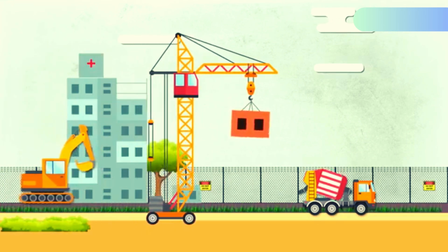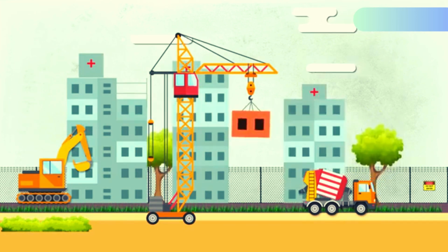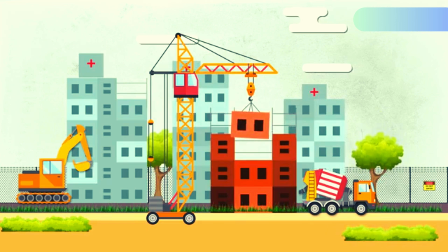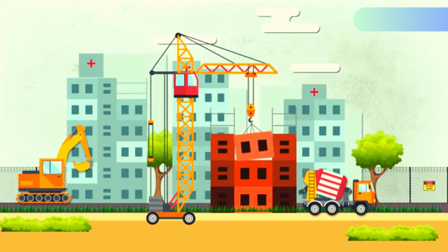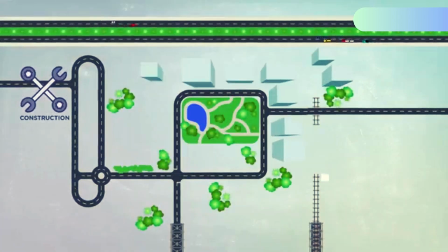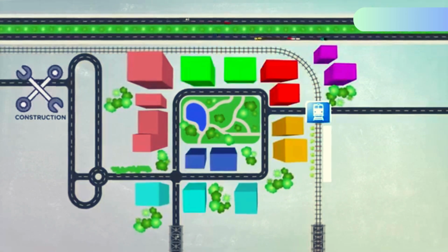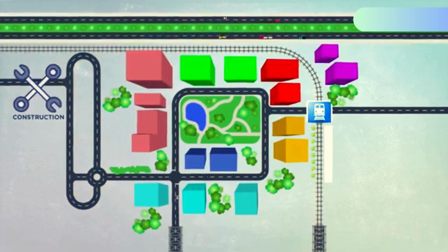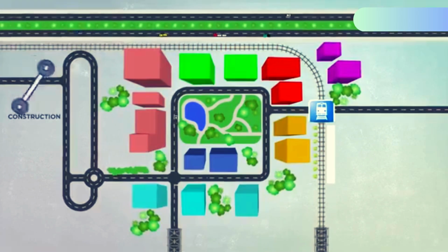and installation of in-ground services, main works, which includes building the structure and installing major furniture, fixtures and equipment, and refurbishments such as repurposing existing facilities for an alternative use. Construction is often divided into different stages, so our works have minimal disruption to patients and staff. Priority is always given to providing clinical services over construction.